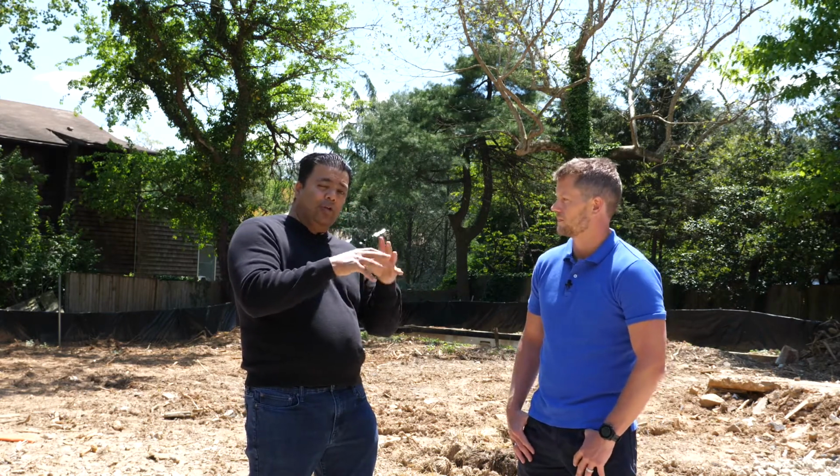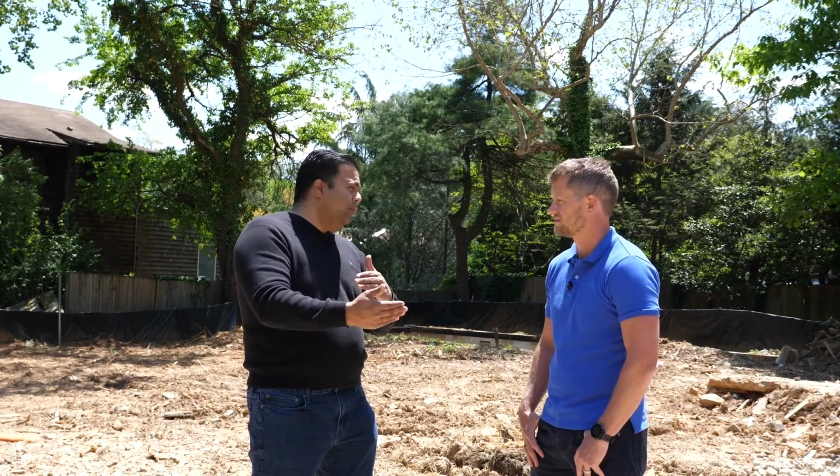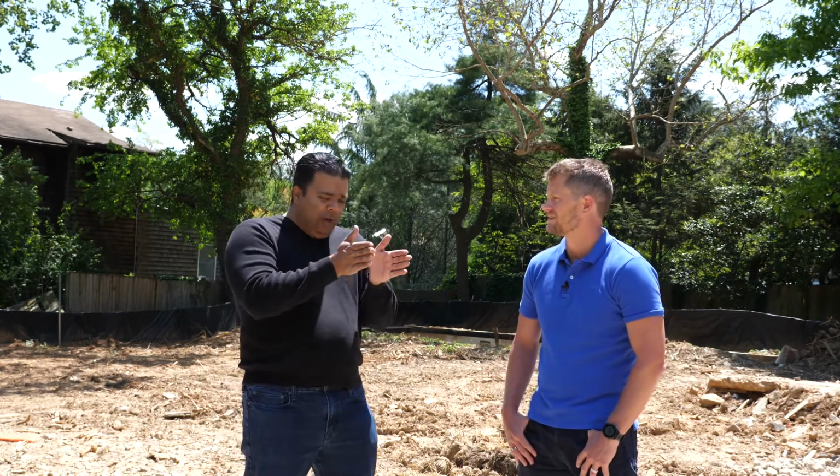For example, we're doing phase 1 of the construction now, which is digging the hole and putting the basement in. Once we get to framing, we're going to need windows. That's one that always holds us up. So order the windows early, because they can take 5 or 6 weeks to come in, depending on the manufacturer you're using. Even though we're in phase 1 right now, let's look at phase 2 and 3, at least a couple of phases ahead, and see what's going to be needed.